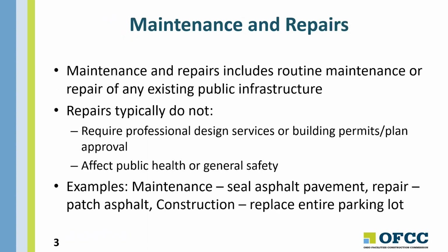So maintenance and repairs include routine maintenance or repair of any existing public facility. Repairs typically do not require professional design services or plan approval by the Department of Commerce. They typically do not affect the public health or general safety.